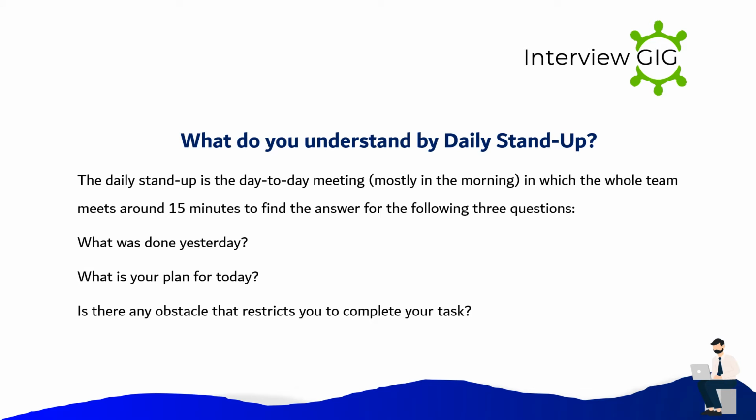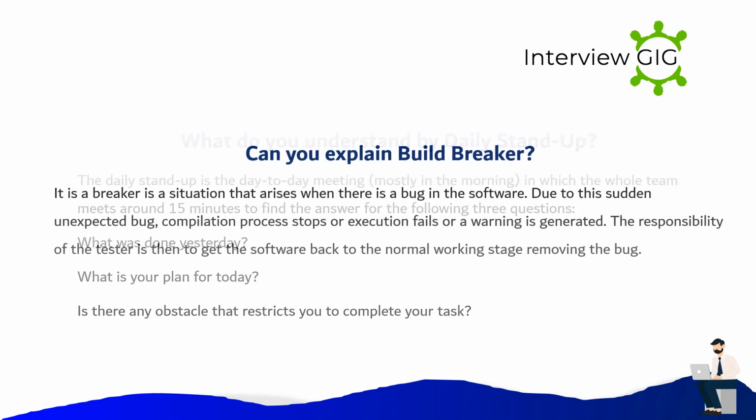What do you understand by daily stand-up? The daily stand-up is the day-to-day meeting, mostly in the morning, in which the whole team meets for around 15 minutes to find the answer for the following 3 questions. What was done yesterday? What is your plan for today? Is there any obstacle that restricts you from completing your task?